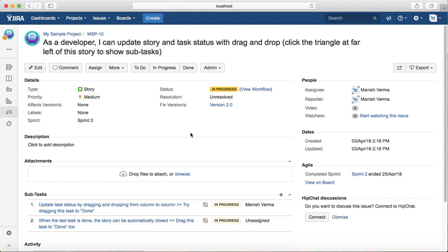For example, if you're a developer in the team and you are developing a story, that whole story might have 5 different components to develop, right? So you create a subtask for each of those components, develop that, and then you create a subtask to integrate all those components into one to deliver that piece of code into the testing environment.